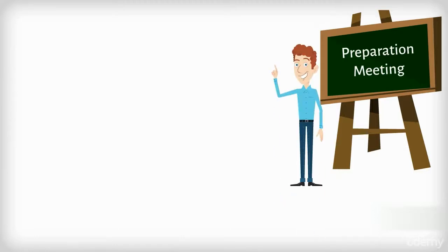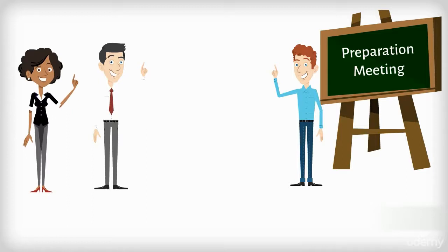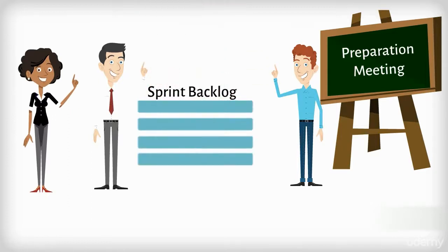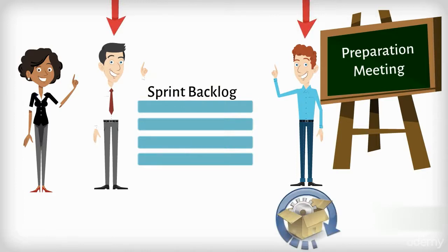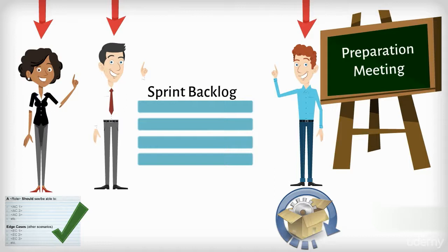For these reasons, I recommend that where necessary, a preparation meeting take place in which the Scrum Master, organizer and facilitator, product owner, and tester gather to review the proposed sprint backlog. The product owner presents the backlog. The Scrum Master usually has enough technical knowledge to know if stories are ready for the team. The tester knows if the acceptance criteria will meet entry-level requirements.